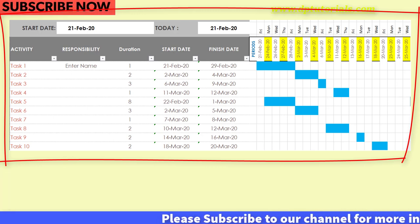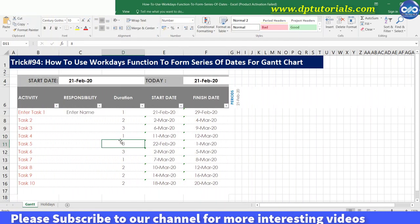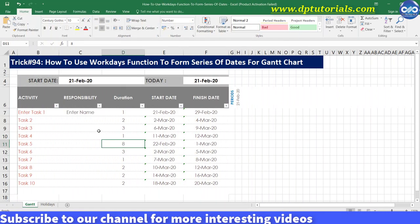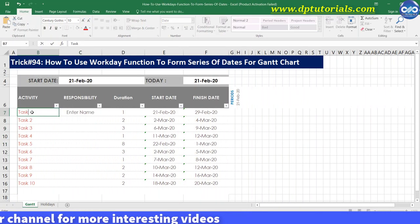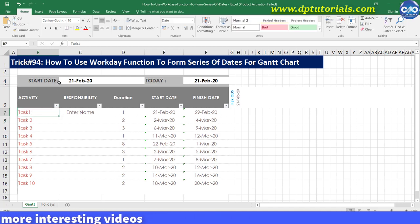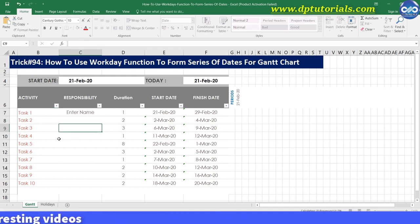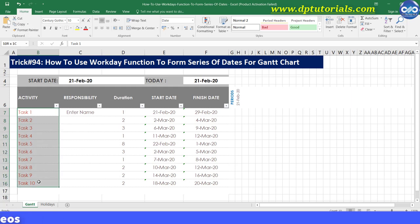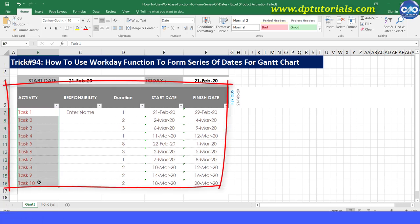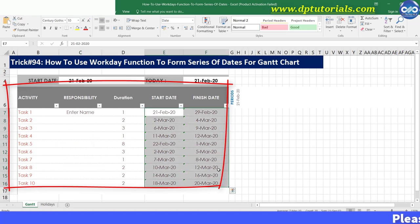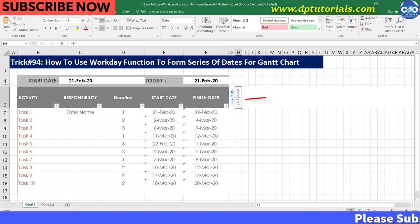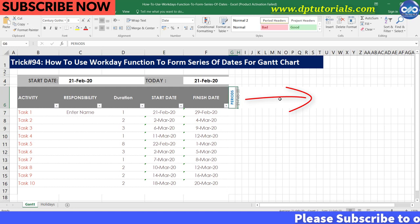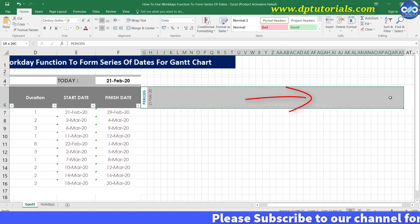Now in this example, let us see how to generate Gantt chart and the usage of workday function in Excel. For a sample project, if I have activities like this with their specific start and finish dates, we would be requiring to put dates in the columns from H onwards to plot the bars and Gantt charts.